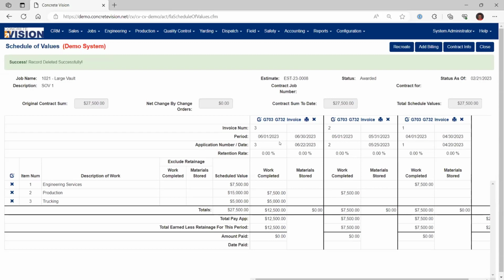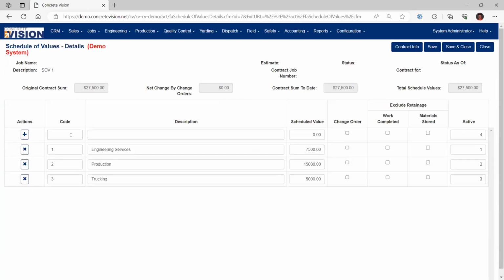Could you review how the change order process ties into the schedule of values? I.e., do you have to use the change order process inside of CV for it to work? Again, like with the dollar amounts and the percentages on this initial phase 1, everything is manual. So if this job was started, you get all the way to the end, and now you're going to add a change order to it, you would be able to just come into here, change order 1, $1,000.